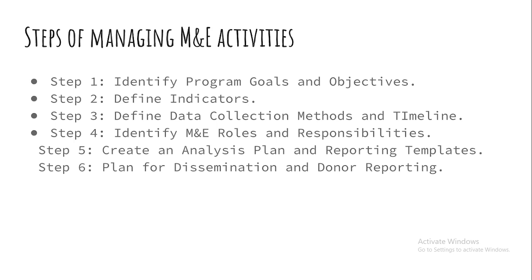Step number one: identify your program goals and objectives. As an M&E personnel, you have the project or program document that contains its goals and objectives. From there you identify outcomes with their indicators, activities that feed into achieving the stated objectives, and the outcome or output indicators you'll be monitoring and evaluating.